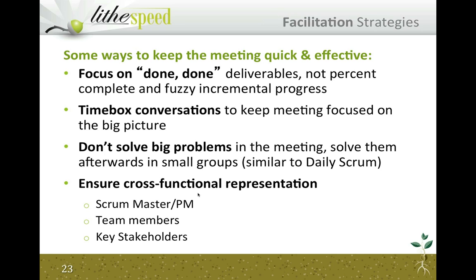What we really want to focus on here is getting away from the percentage done thing and moving more towards some point where we can say, there, something significant happened and it is completed. Again, this is one of the tricks to really making it work: determining what those concrete deliverables are and how to describe them. It tends to be one of the things that you adapt most as you use the system over time.